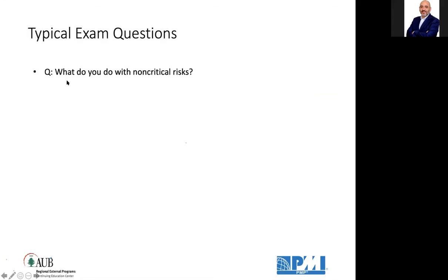Typical exam questions. What to do with non-critical risks? They will give you different scenarios in the exam. You should pick up a hint from the question that this is a non-critical risk. And they will ask you what you do with non-critical risks. So what do you answer? Always document them in a watch list and revisit them periodically to see if their scoring has changed.